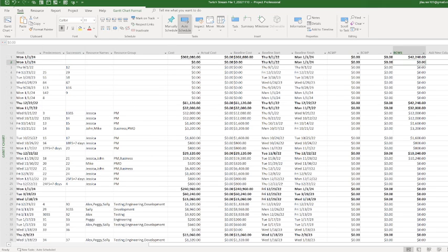Anytime you want to understand your indexes and your costs and your variances, your EV is always part of the equation. And what EV says is, how much did I earn? That's based upon the percent complete times your budget at completion. So it's how much percentage you actually accomplished, which is where you also get your actual cost: how much did you actually spend to get there?